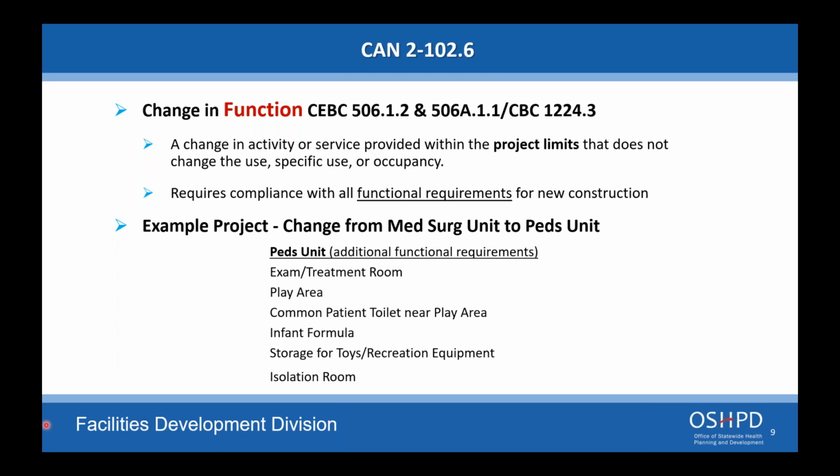Now, if you switch this and you're going from pediatric unit to a med-surg unit, what are the new different requirements for med-surg? There actually isn't any. You can actually do this with zero construction. You just reassign the rooms that might have been used for these other areas, play areas. But you can conceivably do a zero construction change from a pediatric unit to a med-surg unit.